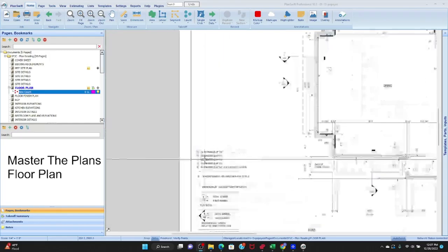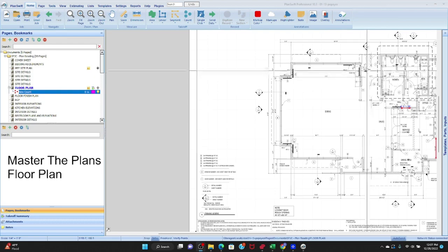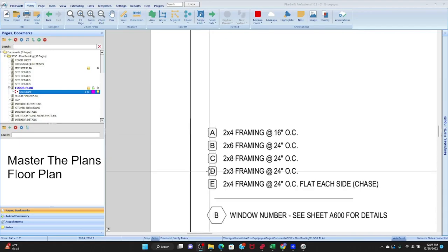Right, so we're the framer. We know we're framing wood walls. Okay, and now the only thing left to do is to just determine how many linear feet, right, of each type of wall. Okay, floor plan, the purpose is to identify the types of walls, identify what we're making them out of, and then use that plan to measure what? How many linear feet?